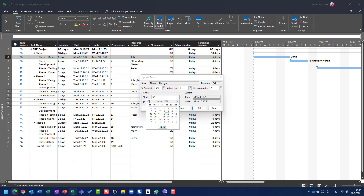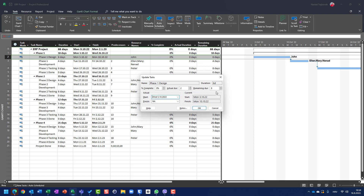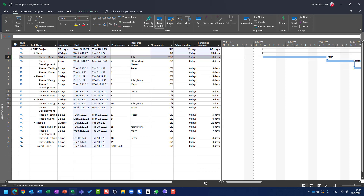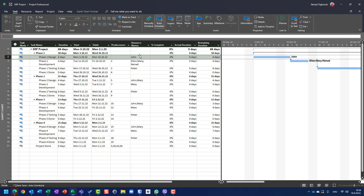So: actual duration is two days, remaining duration is eight days, total duration is ten days, and percentage complete is 20% — calculated as two days divided by ten days. The actual start date is now changed to reflect the real start.